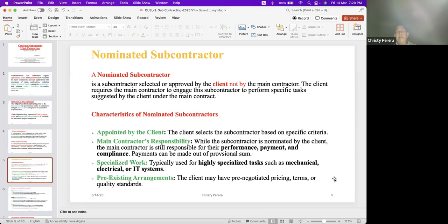I will keep that 20 million, whoever the contractor comes, the provisional sum is 20 million. Separately I will keep that money, because there are some areas that I want to spend.